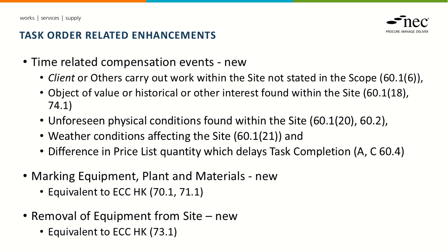And recognising that the price list may include quantities, we brought in the provision around if the quantities turn out to be a lot more and hence take more time to deal with. That could potentially affect how quickly task completion could be achieved, and hence that's a compensation event.